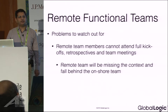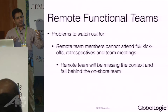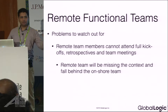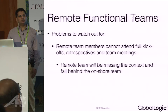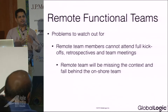As far as stand-up is concerned, it should be maximum 15 minutes. In the stand-up, you say this is where I am, I'm stuck here and need more information. Stand-up is just for the update and synchronization, and then whatever needs further discussion, you take it offline.